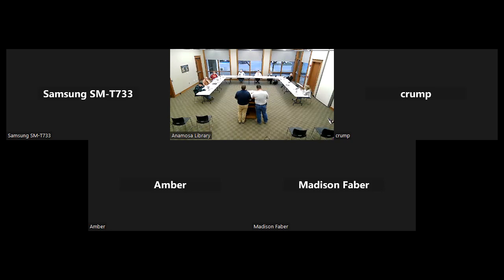I just took some quick notes. Winter shutdown. It's a pretty good winter to be working outside. Could you give an explanation as to why they were not able to complete in a winter that most would want to have if they're working in that environment? It had to do with concrete patching. Even if the winter is mild, if we're still under a certain temperature, you can't pour. There are ways to pour concrete in the winter, but it's very expensive and time consuming. It requires a lot of heating and additional expenditures, so it was actually a cheaper option to pour a temporary patch than to go through that effort.